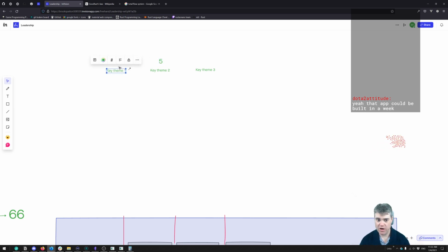Okay, now that I've arbitrarily chosen this as a 5, these other key themes I now compare to this one to say, what are you? Well, compared to that one, you're actually pretty big. So you're a 21 and you're a 13.